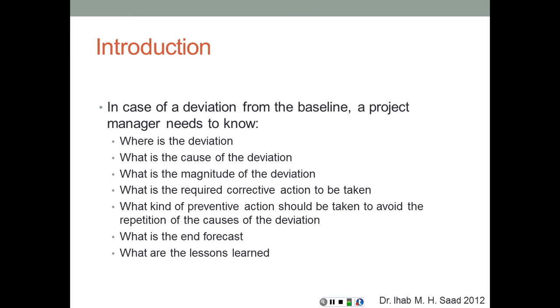If we keep progressing at the same pace, are we going to be able to finish on time? If it's a non-critical activity, are we within our float so it does not affect the schedule? If we are in a critical activity, then definitely it's going to affect the schedule. And most importantly, which is what you can carry from one project to another, is what are the lessons learned.